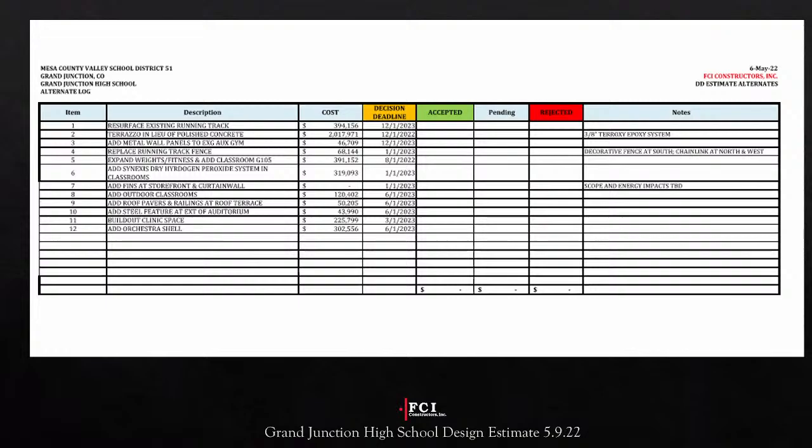All those current bid packages, like the helical piers, what percentage increase have you seen on those over what you estimated? Well, we actually saved money on the helical piers because we had estimated driven pile originally, and so we had quite a good savings in the helical pier side, and we were able to work with the design team on doing some things with wall thicknesses of those, and we're going to reduce wall thickness and fill with grout and do some different things